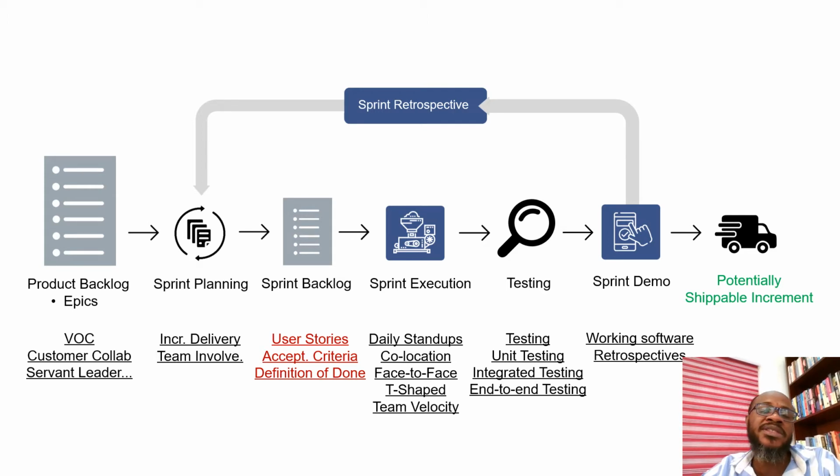User stories contain three embodiments. The first structure represents the persona, the person performing the action. The second structure represents which action is being performed or which functionality is expected to be completed. And then the third structure represents the objective that functionality satisfies to the end user. Now remember, user stories come with acceptance criteria.